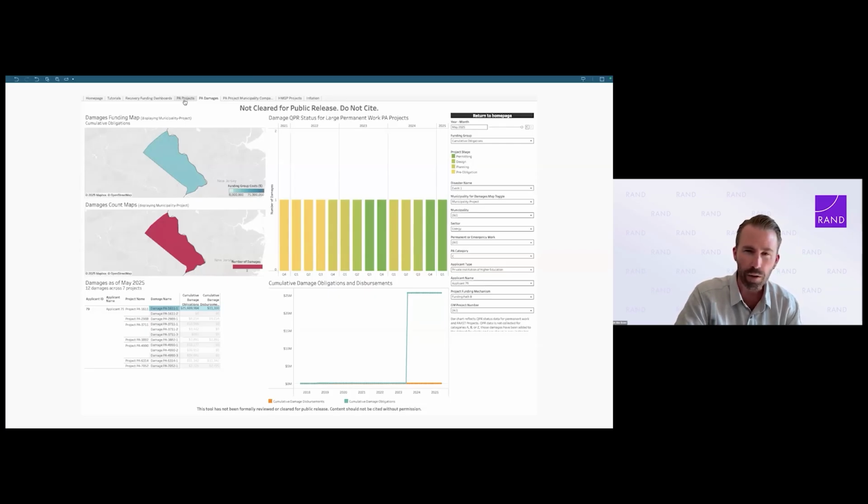Second thing I want to point out is this pattern of backwards movement. We're showing it for one project here, but we've seen this play out across hundreds, sometimes thousands of projects. And this just destroys progress. It really can slow down a recovery. So if any of you in the audience right now are working a disaster, I would encourage you to look for this pattern where projects are going back and forth through process steps.